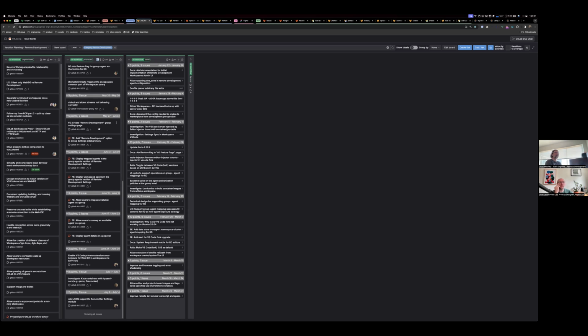Everybody agreeing about what different weights mean, all that sort of thing. Well, there's different knobs and levers for that, which is the importance of having a consistent team with consistent experience working on the same backlog of the same project. And most importantly, the iteration planning meeting is sync. So when you discuss them and when you rock, paper, scissors to estimate them, everybody gets this tribal knowledge and feel for like, this is the 1, this is the 2, this is the 3, this is the 5.